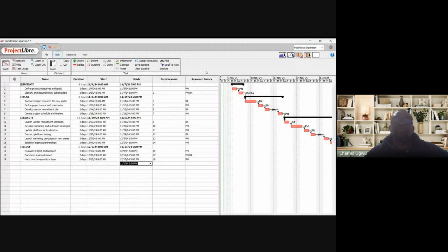The purpose is that even during audit, they want to see how the project plan has been changing, why it has changed. It happens a lot, more especially in public sectors where there's a lot of audit. When there is a change in a project and you capture any change, you must show how the project, this is going to be the history of it. Project plan needs to be a historical document. So any change in this project plan after it has been approved, then it's no longer the original project plan.